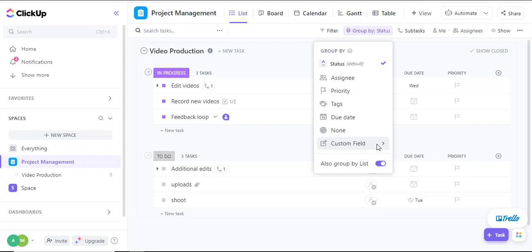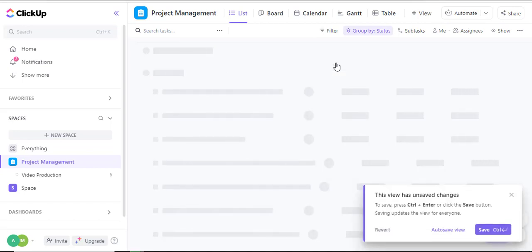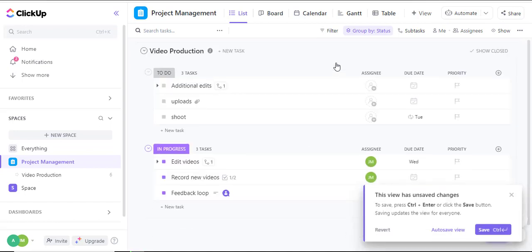Now we only want to view tasks that are in progress, so the easiest of these is to group by the status, because the status complete or the status in progress defines any of the projects that are currently in place. So if I click on the progress option, click by status.